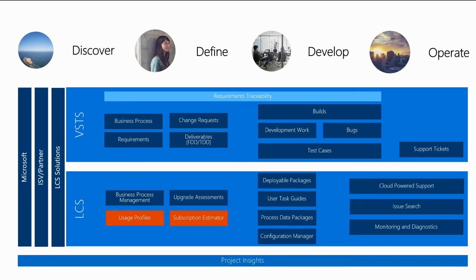The reason why I ask who's done infrastructure estimating is this is not just a pure technical job. You need to involve functional users, business users, and see if the user tells you, yeah, we need to process 30,000 sales orders a day. Do you need to process it in midday where everybody's online, or is this something you can process during off-peak hours? Those things, an infrastructure guy would not know. You need to involve everybody in the project to have that first look at how we're going to size and how we're going to create our usage profile.